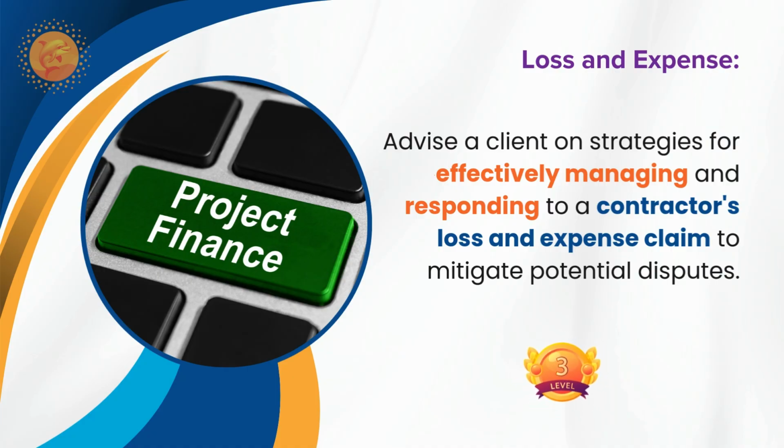So we will not straight away reject it immediately, although if at all there won't be any substantiation submitted by the contractor for his entitlement, then you will start asking further supporting documents or records or evidence. So in that way you will take it up to the next level. Not immediately, usually they will reject this kind of claims. Okay, that is the practical scenario. That's why this question is like this.